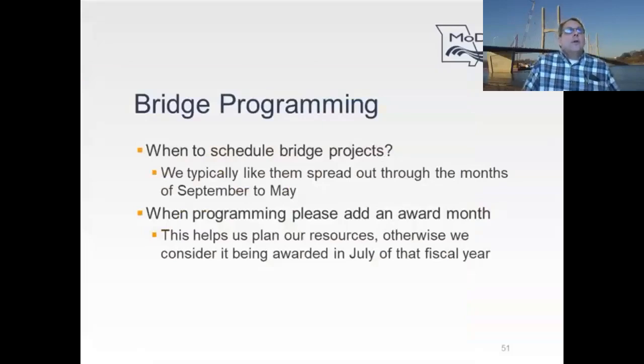But we would like you to spread them out from September to May, and this does a couple things. One, we have limited staff, so we can't review 120 bridge projects just for January and February lettings. But probably more importantly, we have a number of bridge contractors in the state.